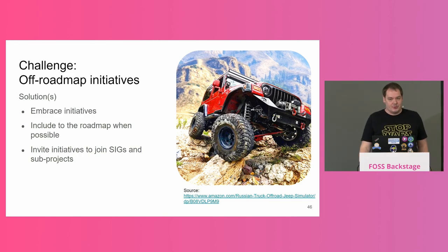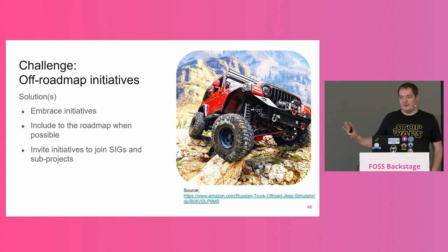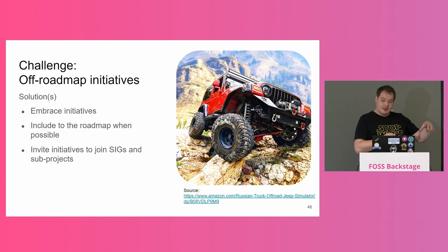And yeah, the problem which can happen everywhere: people like hacking, people like delivering stuff, prototyping, and they don't necessarily update it, even if they operate in your project. And this is what we hit. Unless you go to a contributor and say, could we please have this item on the roadmap? Or maybe even worse, you create it for them, it doesn't happen. And in our case, we tried to mitigate it by various special interest groups, sub-projects, to have separate governance, etc. And honestly, nothing really worked at this scale.